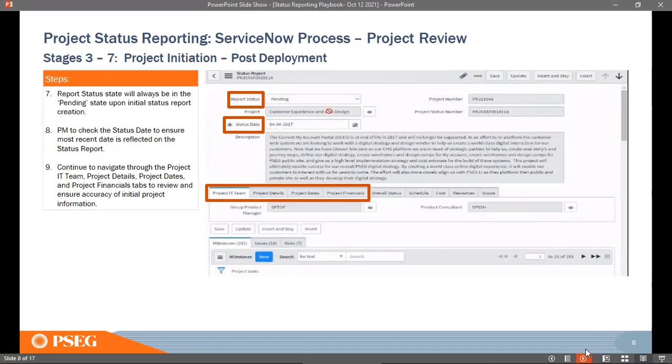Check the delivery date. If it is in the past, immediately make the correction by following the process. The process is to put in a justification document. The document is not complicated. It is a simple document, put up to your GPM for review and approval, go to the sponsor, get it done, and change the date. That will be a real value add for downstream applications, reporting, and further follow-up.